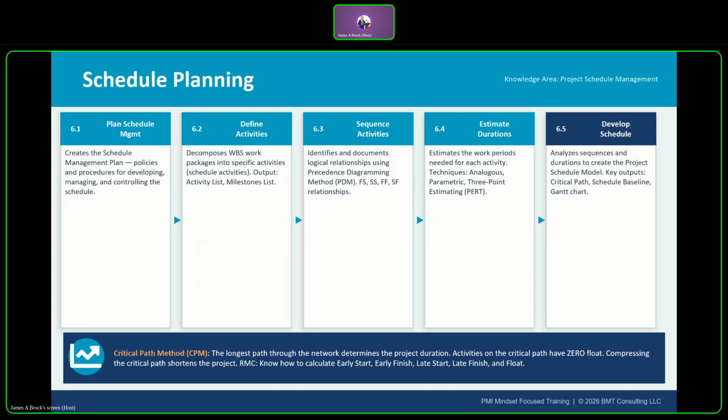And usually on the test, if you're asked to do a 3-point estimation, they are talking about PERT, unless they actually talk about triangular distribution, and then you would not use the PERT model, which is optimistic plus most likely plus pessimistic. But in PERT, it's optimistic plus 4 times most likely plus pessimistic divided by 6. That formula is the weighted formula for your 3-point estimating, and it is most accurate.